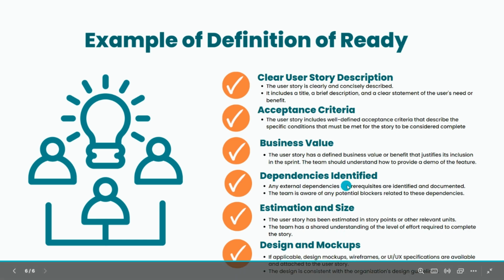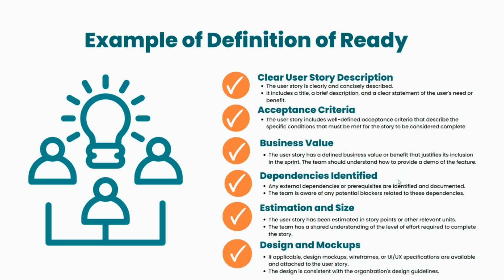Then dependencies identified. If you have any external dependencies, any prerequisites, that should be part of your definition of ready. And the team should be aware of all the potential blockers which can come your way. So if those things are clear or can be figured out while having the grooming session, then they should be captured and should be helpful for the developer when they start the work.